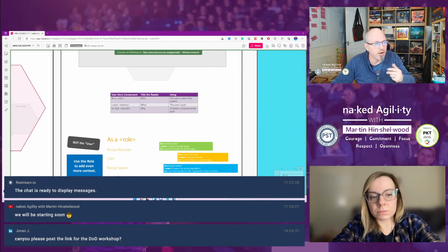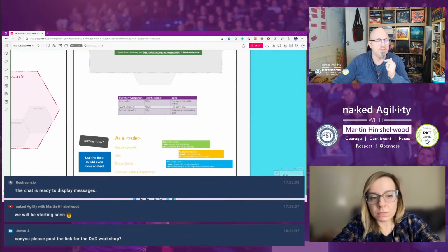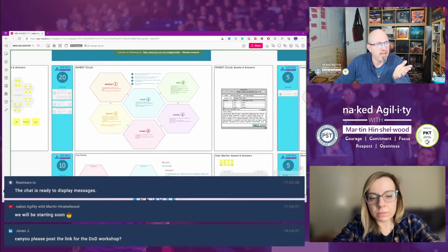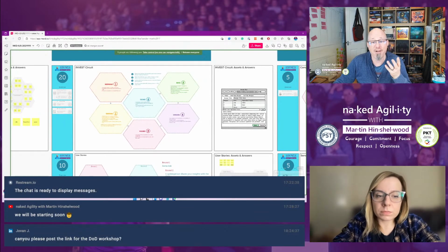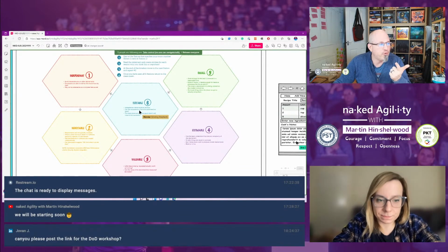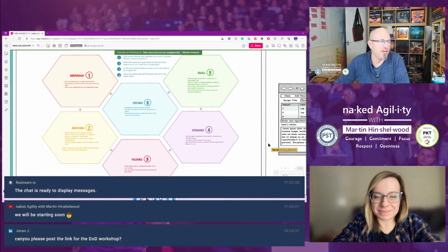Right? But the idea behind user stories is keeping it really simple and concise, so that it encourages you to create more of them. Right? Lots of discrete elements that are very independent. We didn't talk about it, but we usually try and encourage, it's not perfect, the INVEST model. If you're not familiar with the INVEST model, your things on your backlog could be independent, negotiable, testable, valuable, estimatable, and small. I think I did that in the wrong order, but there we go. I can't spell either, so that solves that problem.